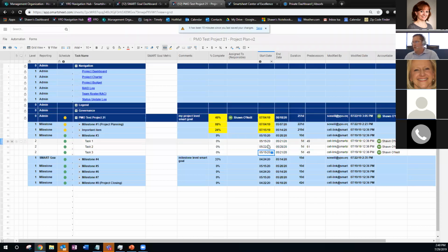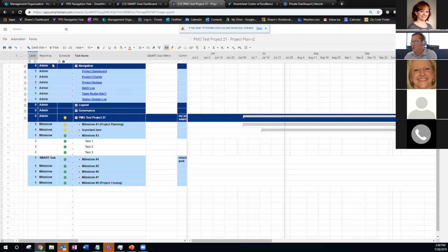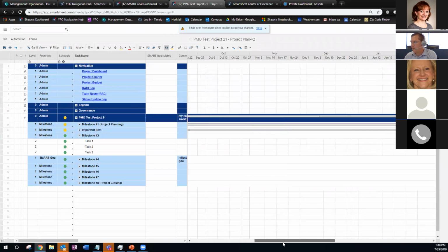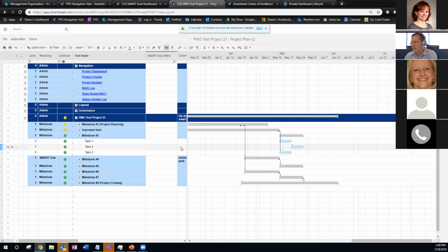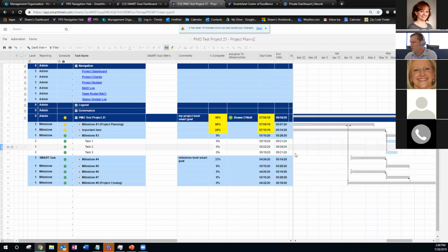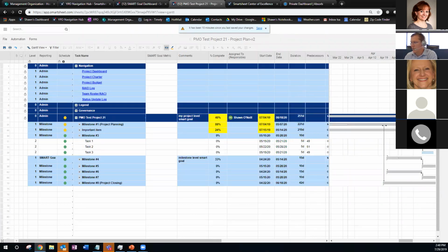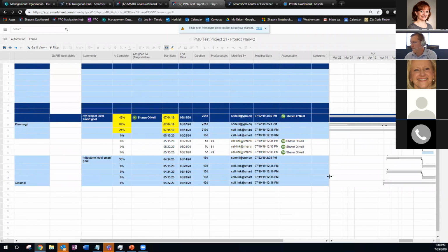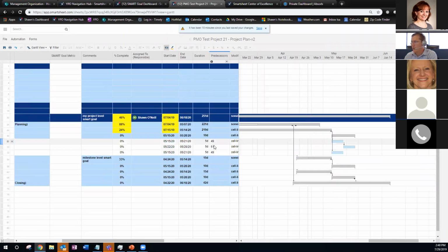These can be graphics. If you wanted to get more advanced and look at what it looks like on a Gantt view, turn on the Gantt view and you can see your tasks. So here you'll see, as I was playing with predecessors, it put them in order, and I'll play with them again right quick just to show it off. So the predecessor, let me shrink this over so we can see it. All right, the predecessor, say that one was on 52. When I hit enter, you'll see over here, it now takes place after that task.